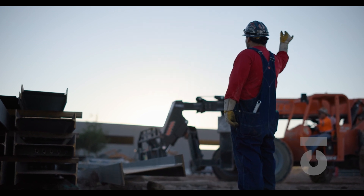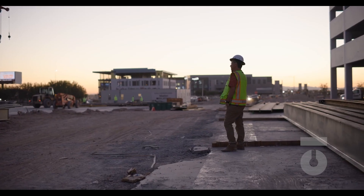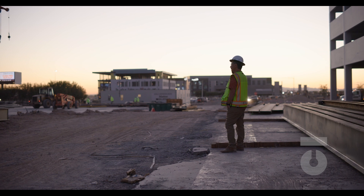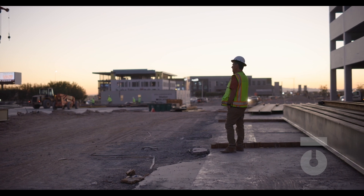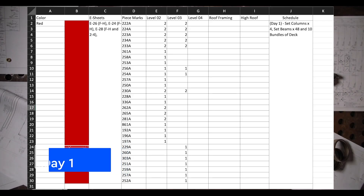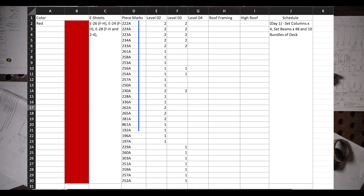Who determines the load list? Typically it is the field superintendent of the job, or potentially the foreman. The load list outlines what material will be brought in that day and installed. It's not just taking what's in the erection schedule and saying, 'I need these 29 pieces brought in for today.'